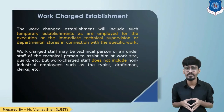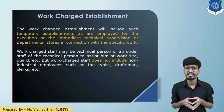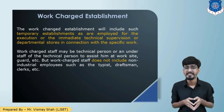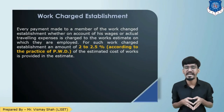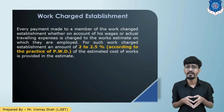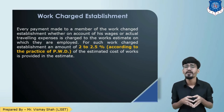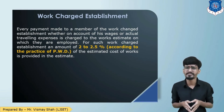The next is work charge establishment. It will include temporary establishment such as technical supervisors or departmental store staff in connection with the work. Work charge staff may be a technical person or support staff such as a guard. However, work charge staff cannot include non-industrial employees such as draftsmen, typists, or clerks — you can only include technical staff. Every payment to members of work charge staff, whether for daily wages or travelling expenses, is directly charged to the work for which they are employed. Generally, 2 to 2.5% of the total cost is provided as work charge establishment.